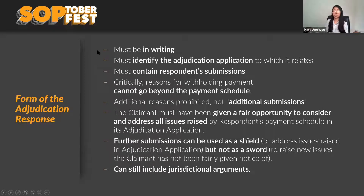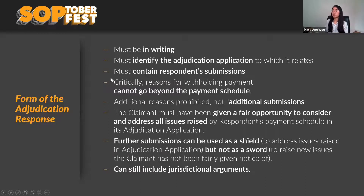In terms of the form of the adjudication response, there's no prescribed form, but section 20 sets out what must be included: it must be in writing, must identify the adjudication application to which it relates, must contain the respondent's submission, and critically, reasons for withholding payment cannot go beyond the payment schedule. Under section 20(2B), you can't include reasons for withholding payment unless they were already included in the payment schedule.